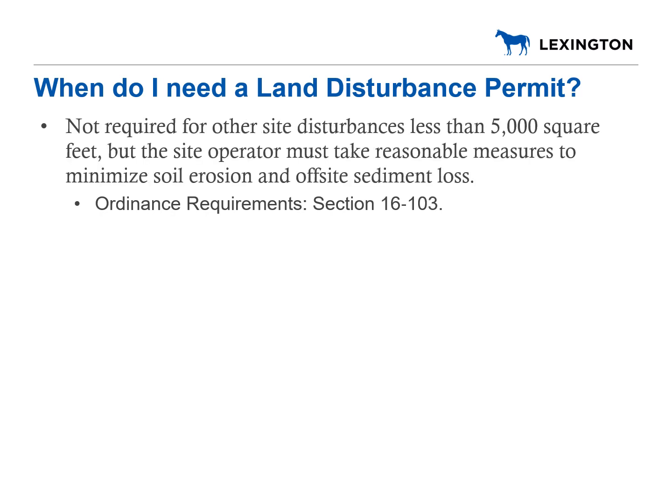A land disturbance permit is not required for new development and redevelopment projects that disturb less than 5,000 square feet, but the site operator must take reasonable measures to minimize soil erosion. Additional information may be found in Section 16.103 of Chapter 16, Article 10, Division 5, Reduction of Soil Erosion in the LFUCG Code of Ordinances.